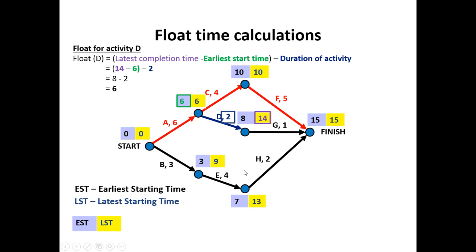Moving on. The float for activity D, it has the latest time to complete of fourteen. Subtract the earliest time to start, which is six. Fourteen take six gives me eight minutes. And from that we take away the activity time of two. So this also has a float of six minutes. Activity E has the latest completion time of thirteen and the earliest starting time of three. That gives me a difference of ten. Subtract the activity duration of four. It also has a float time of six minutes.